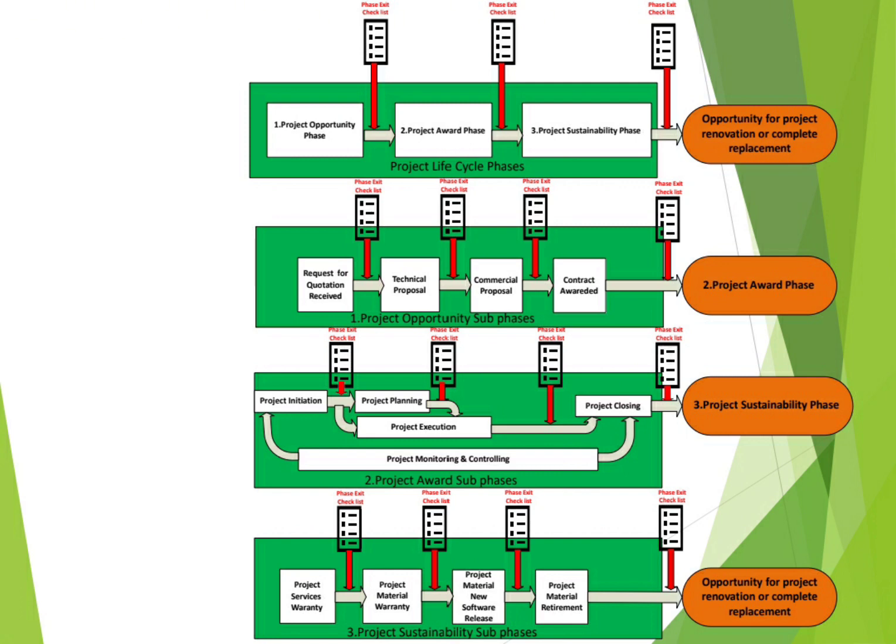You can start the planning phase, but the execution, no. You need to have your advance invoice issued, approved by your customer, the advance payment transferred to your company account, the letter of credit available, all documents should be in place so that you can start your execution phase. But planning, we will come to this, you can start, no issue for this.